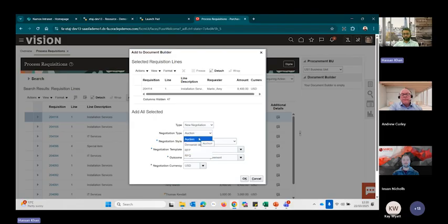We have different types of negotiations available: auctions, Oracle support auctions, RFPs, RFIs, RFQs, the two-stage, single-stage, commercial-based, technical, all of these different things. What we will be focusing on today is in a bit more detail. We will be focusing on a two-stage process where we are going to seal the negotiation and then do all of the technical analysis, then move it over to the commercial stage and do the commercial analysis, and then take it from there.